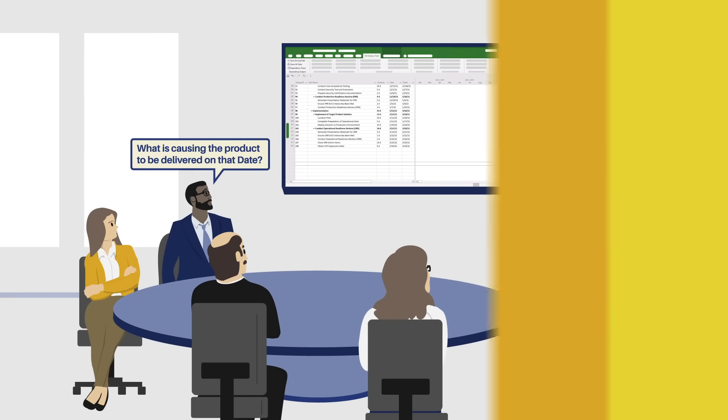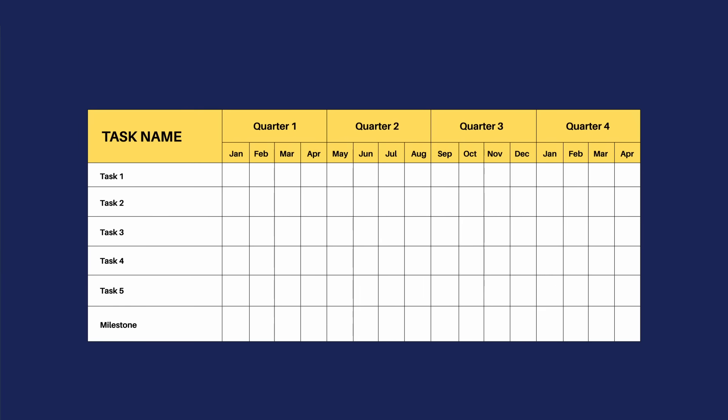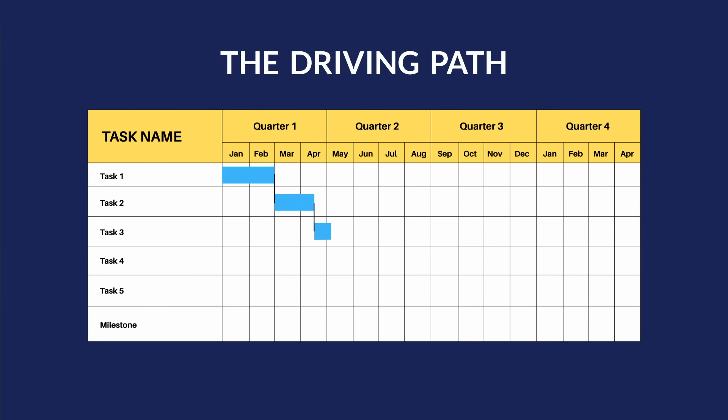That's called the driving path. It's all the important tasks that link together to drive a task or milestone to its current date.